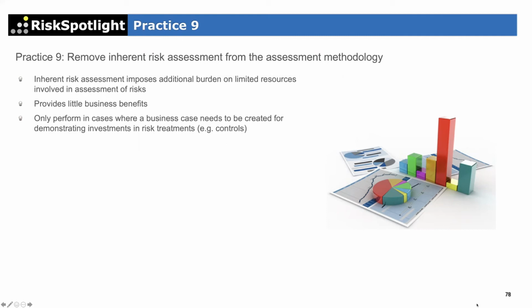So why create that extra burden of capturing inherent risk assessment? It doesn't provide any business benefits. There's very little business benefit, because you're not going to do anything with all those inherent risk assessment responses you are collecting. All your risk escalation and risk reporting is based on residual risk assessment.